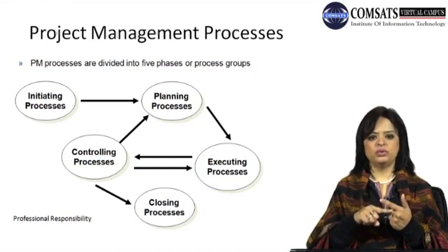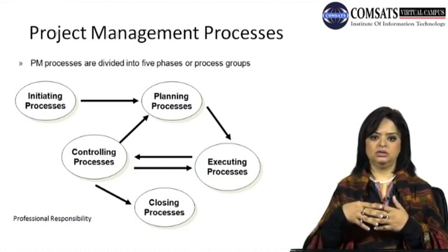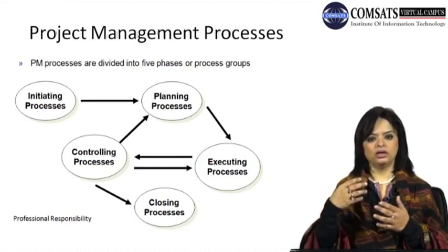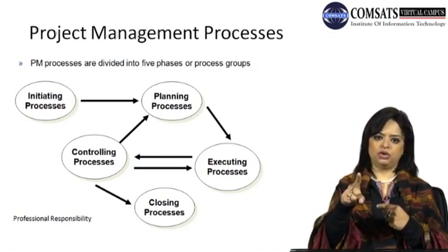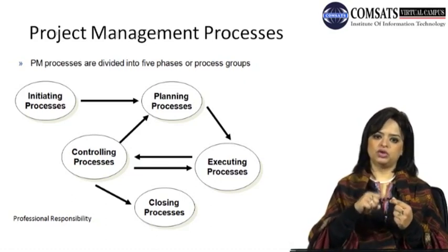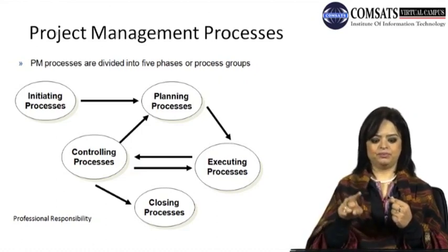If you see any of those variances, and now you have a game plan to get back, either to get back or implement those changes, you go back to the planning process. Hence that arrow that leads from the controlling to the planning board or the drawing board of the project. And the cycle starts again.